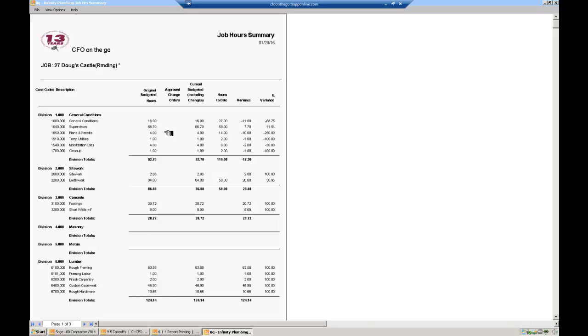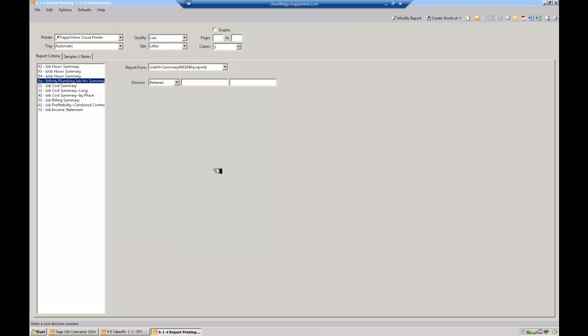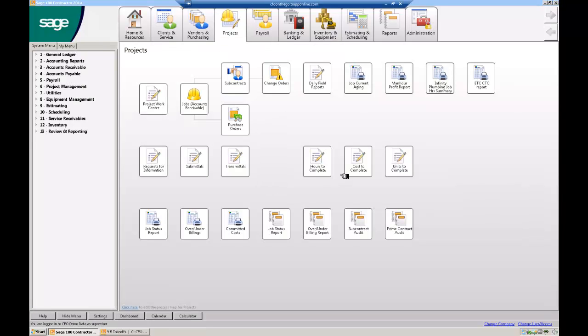So I can give this and share this with your project people. There's no dollars on here. It just says, hey, Joe, you're supposed to do this in an hour and it took you 2 hours. How'd that happen? You're supposed to do this in 4 hours and it took you 6 hours. How'd that happen? etc. So you identify all of the overruns and identify those for future estimates. So that's a great report that we have. There's other ways to look at it as far as unit cost, dollars. Anyway, standard reports here, just a ton of them. But I'll send you some samples of those. But I wanted to jump into the service module real quick.